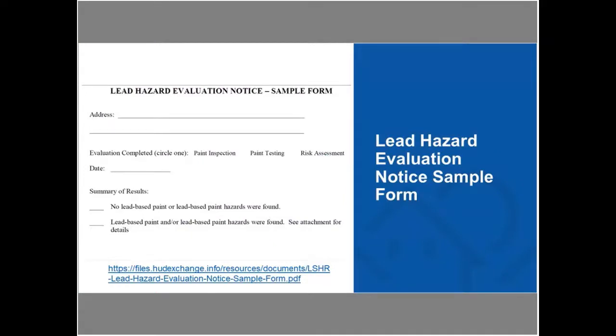As part of this, we've always mentioned that the notification process is really important. In the case of single-family rehabilitation, we're going to be notifying the owner, but in some cases that single-family unit may be occupied by a tenant rather than the owner, or maybe it's a double, where one side is the owner and one side is a tenant. We're going to make sure that they are notified about the outcome of our lead hazard evaluation.